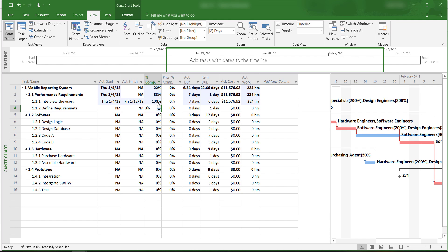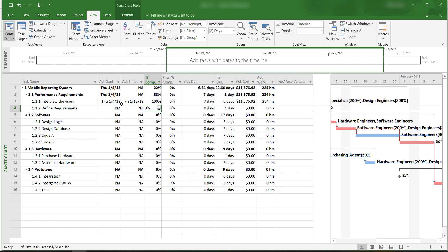Note that Microsoft Project assumes that we will start on the planned start date and finish on the planned completion date. It also assumes that the activity will take the planned number of days to complete.